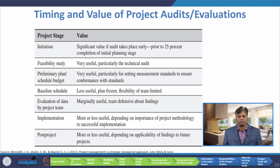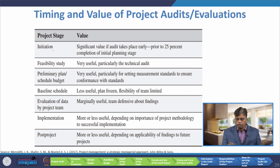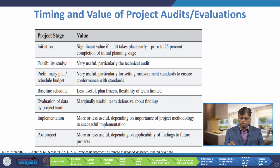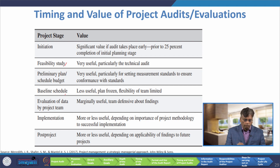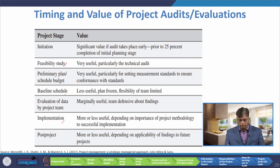Now we will discuss about the timing and value of project audits. If the timing is the project initial stage, significant value exists if the audit takes place early, prior to 25% completion of the initial planning stage. At the time of feasibility study, it is very useful to do auditing, particularly the technical audit. At the time of preliminary plan and schedule budget, the audit is very useful particularly for setting measurement standards to ensure conformance. At the time of baseline schedule, it is less useful because the plan is frozen and flexibility of the team is limited. During evaluation of data by the project team, it is marginally useful as the team tends to be defensive about the findings. At the time of implementation, it is more or less useful depending on the importance of project methodology to successful implementation.